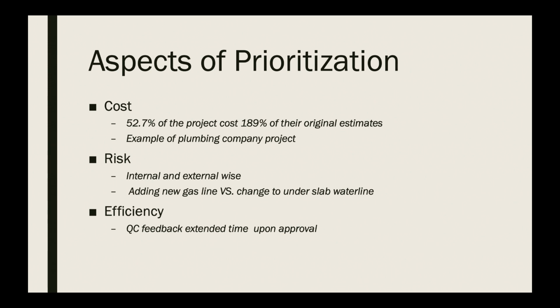However, burying pipes beneath the concrete requires stronger and better insulated materials, and that could also increase the stability of the new system. Moreover, getting it done at the roughing stage will also decrease the cost and effort compared to redoing it at the waterline stage. It could bring more benefit to home builders and buyers too.